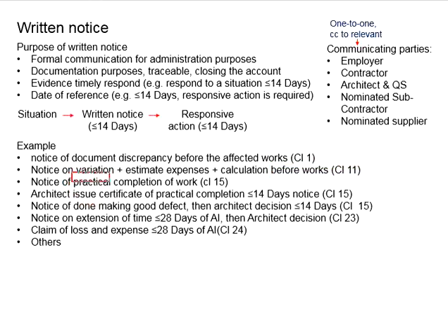Or you send in written notice after you have practically completed the work. Then the architect will have to, within the stipulated time, evaluate your work and come up with the certificate of practical completion. Without this written notice, the following actions will not trigger. The architect issues the certificate of practical completion within 14 days of your notice of practical completion of the work.